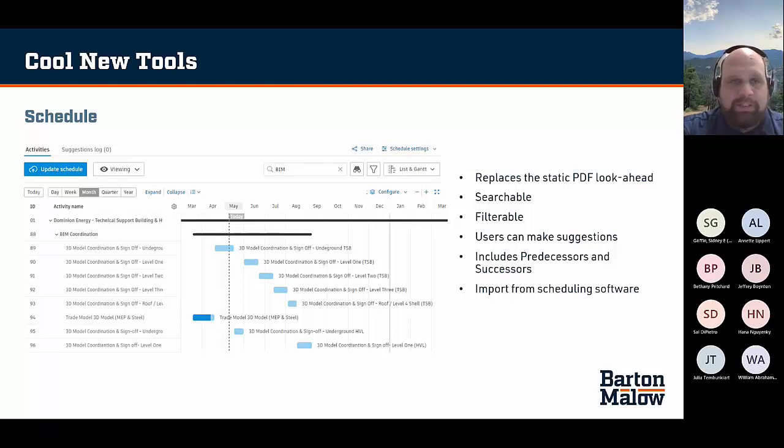So all the project team has to do is export a CSV, or I forget the exact file format, and import it into Build, and that's all they do. They update it every 2 weeks or however often they're updating the schedule, and it's done. It's super easy. It dramatically increases the functionality to a large part of the team, so that is why it's my favorite tool of all time. So highly recommend it. I really hope it's on the build or on the design side of things. If it's not, talk to Autodesk, see if you can get that too, because I imagine you're pretty schedule driven too, with deliverables and stuff like that.